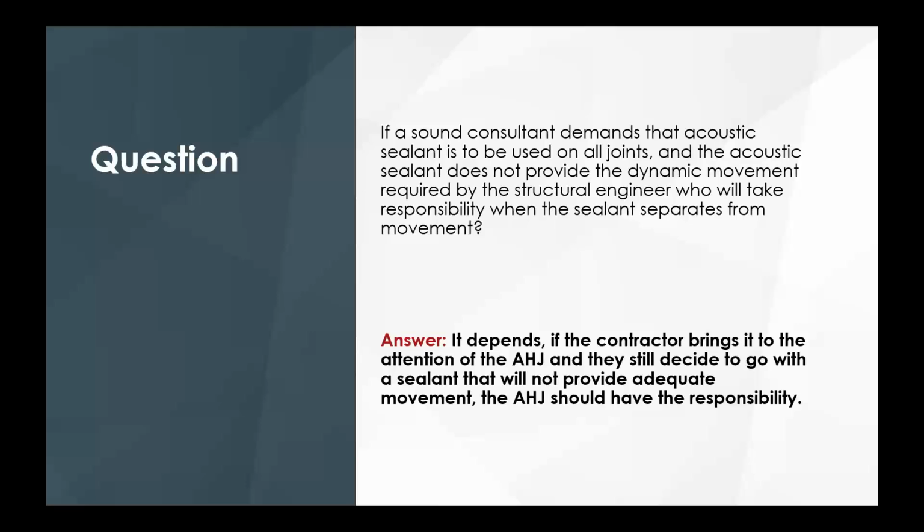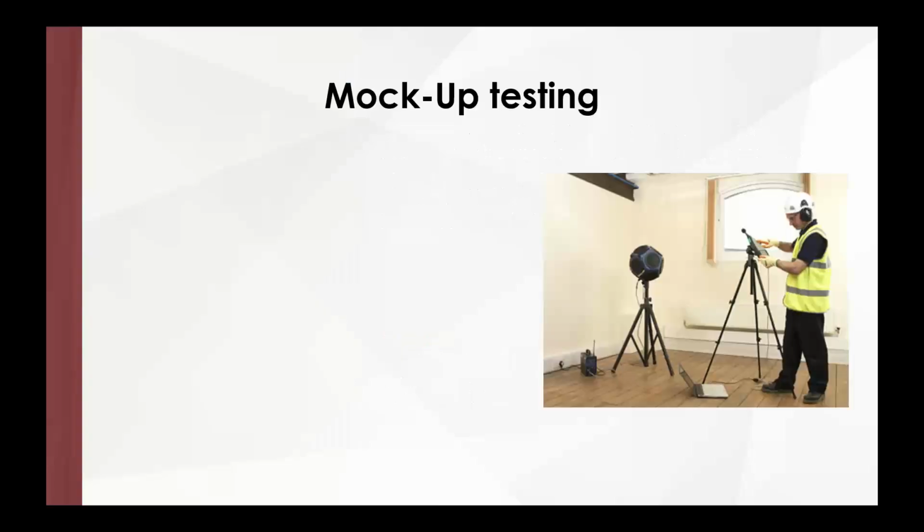Because I will tell you one thing. In a construction defects case, at the end of it, if you're the contractor, you will notice something kind of peculiar. All of a sudden, you are the smartest person in the room. They will say constantly through that, well, you should have known. You're the professional. So it's better to bring all this stuff up in the beginning, because they're going to blame you for not doing it in the end. So always bring it up.